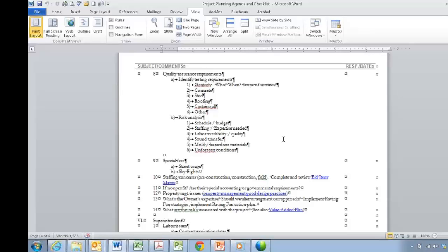Staffing concerns. I'm sure everybody's very busy right now. I can't stress enough how this has to be discussed. And it may not be the permanent one. At the outset of every job, I always like to have a superintendent assigned, even if they're not sure he'll be the one building it, to get that input, to be that aid, to be that sounding board for good collaboration from the field perspective, and making sure we have adequate coverage on both the pre-con and the construction phase from the management side. Part of that, though, requires the team to be looking out for each other and being honest and understand what we think the real work effort will be. Many times that work effort is a lot more than we anticipate, and that's how we can get caught short with staffing.